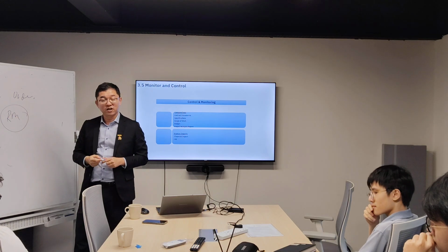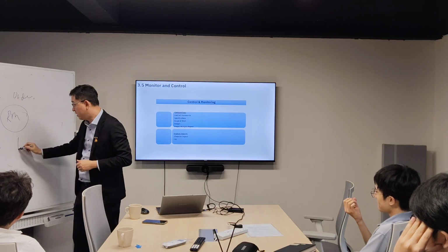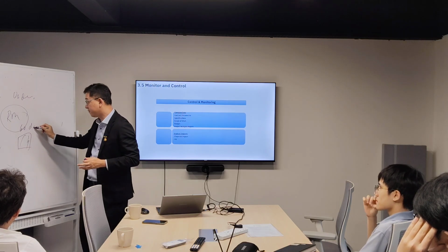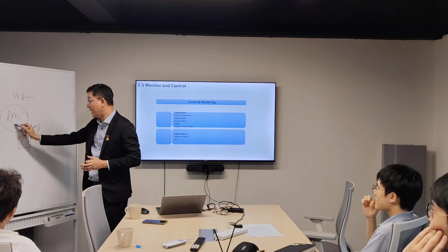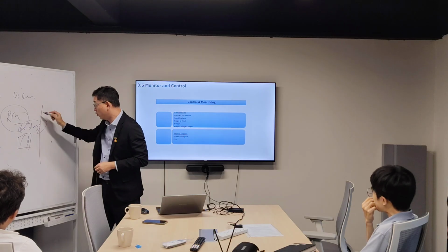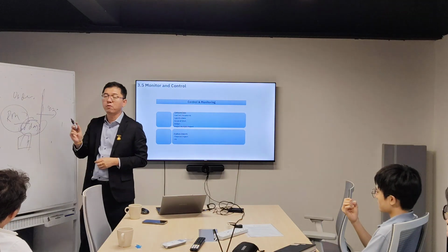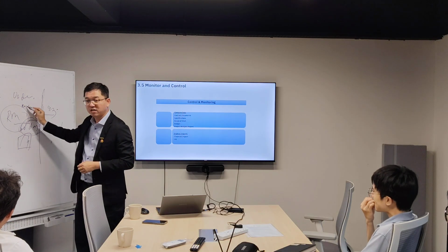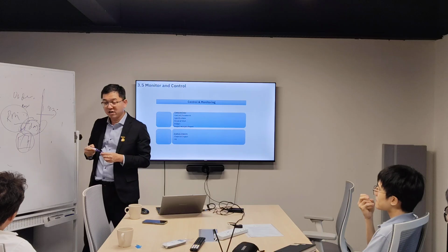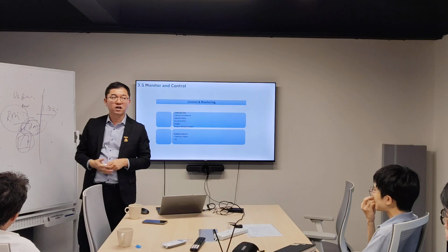additional money. Why? Normally, your people work 8 hours. Okay? But because of this, you need maybe, let's say, an extra 60 days. By right, you are allowed to extend for 60 days. But now, I do not allow you to exceed these 60 days. I want you to still complete on this day. So these 60 days, no problem. You add on resources to do OT. And with this additional criteria, before you start work, you issue me, we name it what?